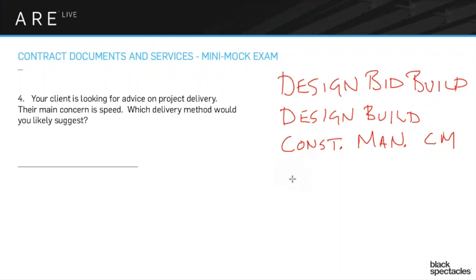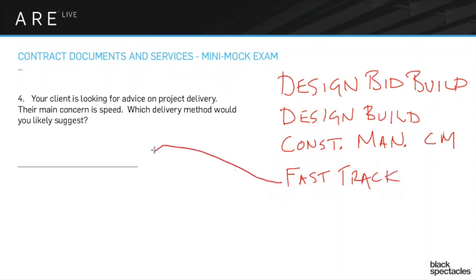Design-build and construction manager each have their advantages, but none of them are really about being super fast. The main delivery method that's about speed is fast track — and it's even in the name. Fast track is going to be the answer here.